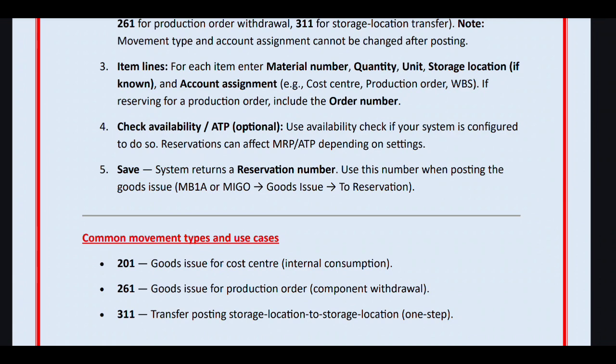Once we plan our stocks in the maintenance order, the system by default generates a reservation number against movement type 261. 281 for the goods issue from SLOC directly to the project WBS. The system again plans a background reservation with movement type 281, right?